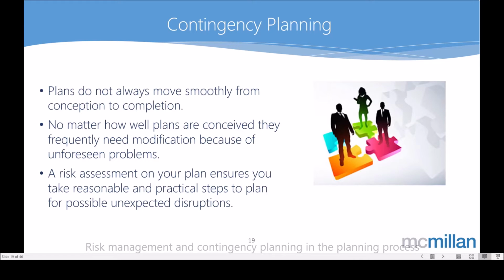We're going to have supplier B on standby, or we've got an alternative way of dealing with it if that's the case. So that would be an example of some contingency. But in some cases, we may not have a backup plan. In some cases, we may actually have an alternative strategy, or we might want to put something in place to avoid that risk altogether. And that might be part of a risk assessment or risk management plan that we have.